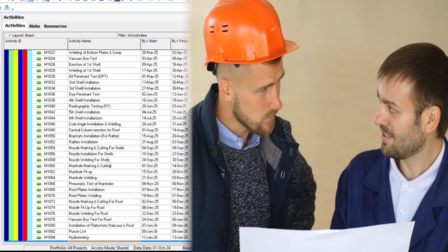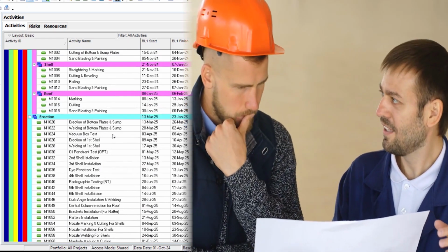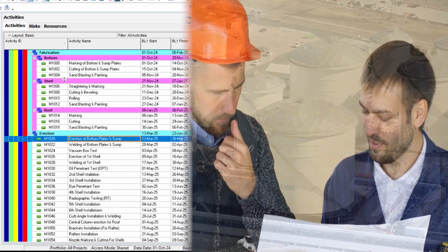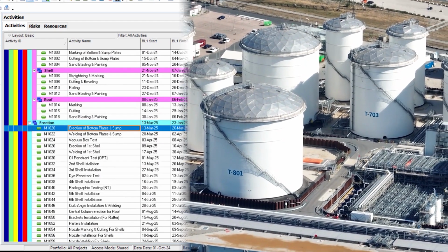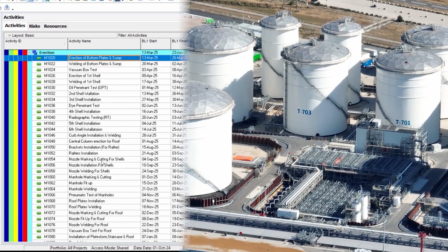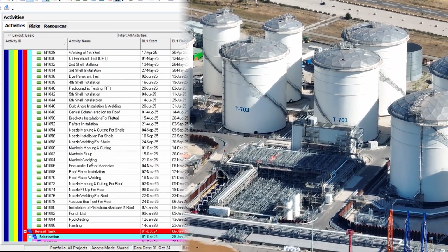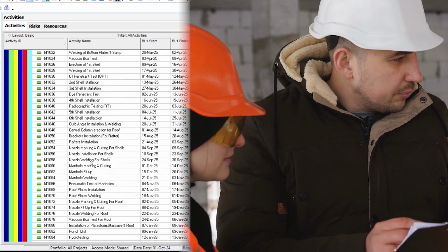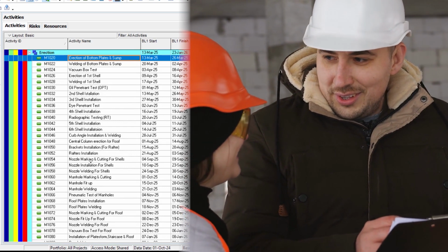So this is the scope management for the fabrication of these plates, civil works, and then dependency model is explained like everything. You can see that once bottom plates are done, you are going to start erection. Then shell plates will be done. Then you are going to make erection. Then plates are done. Then you are supposed to make their erection over here. So accordingly, testing is going on, and your site team is going to document each and everything, reporting back to the head office. Planning engineer is supposed to take that data. So what is done, what is left behind, as per time management, cost management, and resource management.